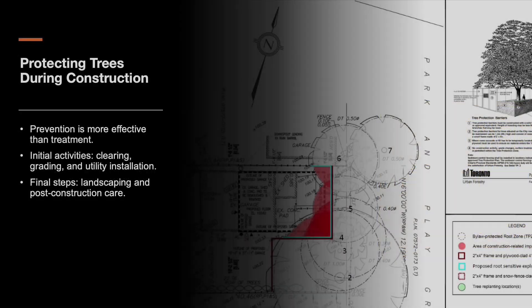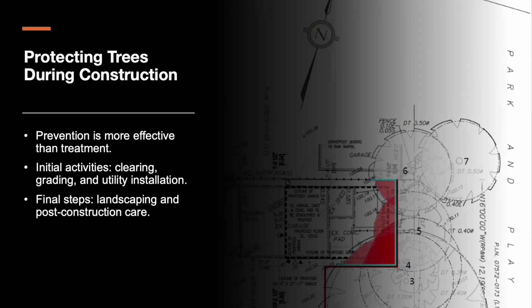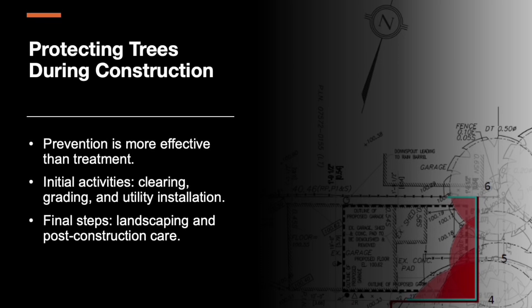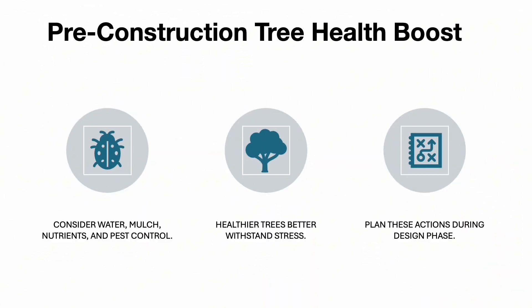Once the plan is in place, it must be enforced. Physical protection includes fencing, signage, and monitoring. Working in the tree protection zone should be avoided, or done with tree-friendly techniques. Before construction even begins, arborists may recommend mulching, irrigation adjustment, pest control, or nutrient management. Healthier trees withstand construction stress much better.